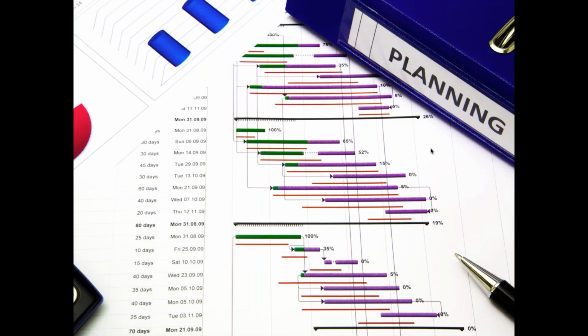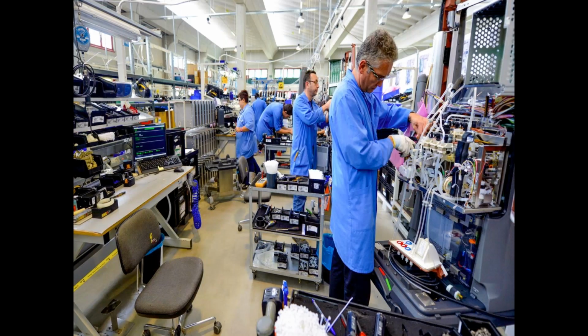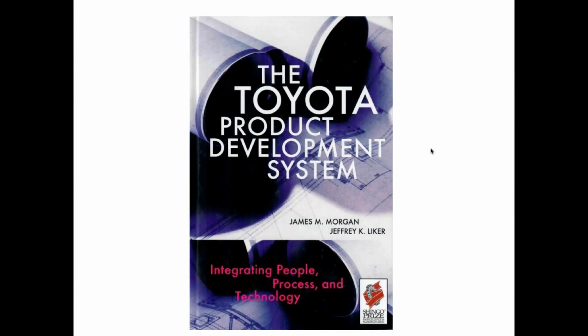Instead of doing this detailed Gantt type chart where you're trying to plan all the details, what they learned at Toyota is that was much less important. When you're looking at coordinating all this work, they moved to a fundamentally different approach with the Toyota product development system. And in this case, they would have a chief engineer, and that chief engineer was responsible for the vision for the product, the design objectives, but he was also responsible for the delivery of that.